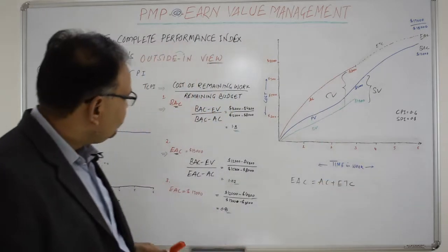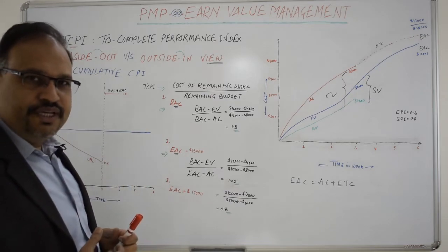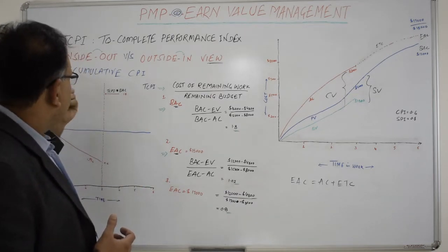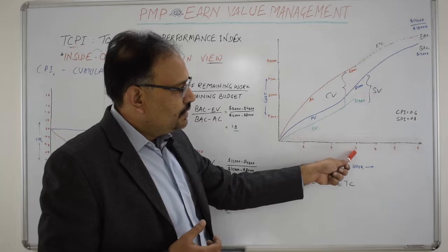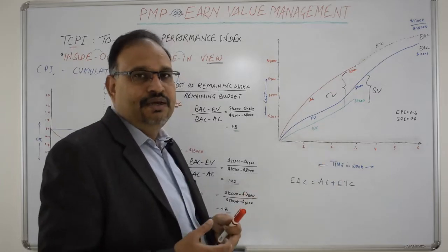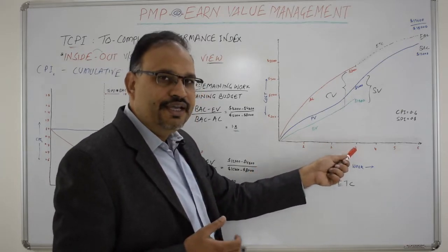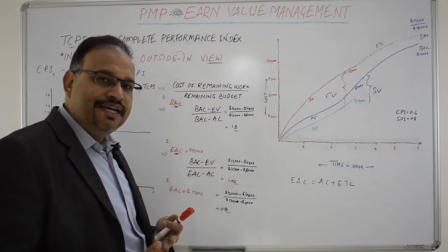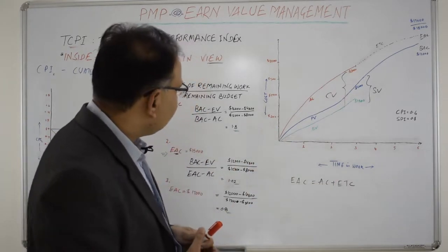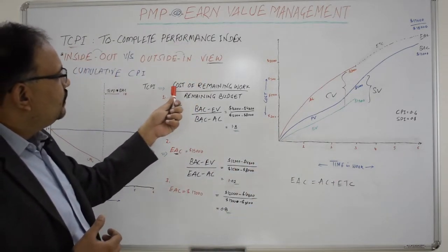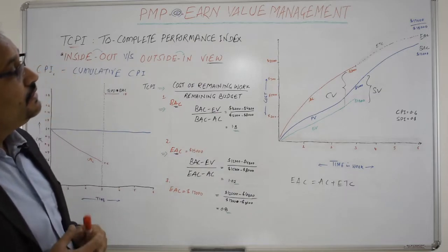Another term to understand here is CPI-C — the Cumulative CPI. In this example, CPI was calculated at the end of week three, but we could have calculated it at the end of week one, week two, and then week three. The CPI calculated at the end of week three would be the cumulative CPI. The formula for TCPI is: cost of remaining work divided by remaining budget.